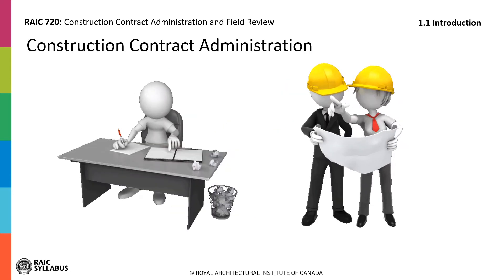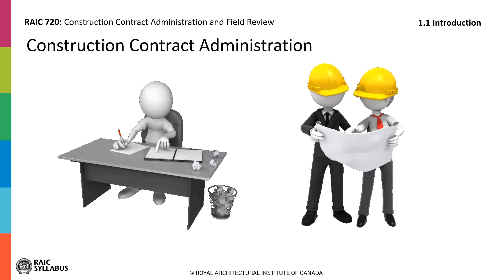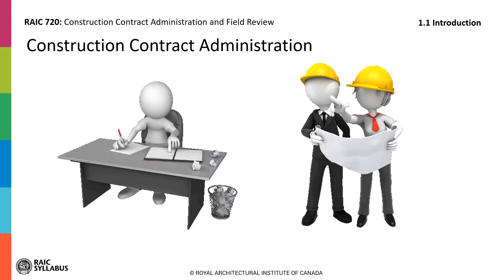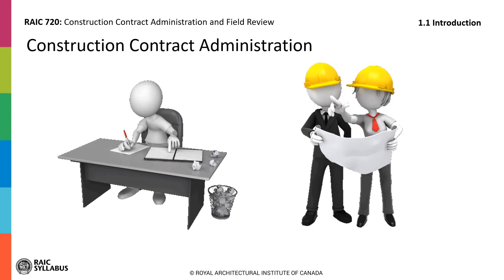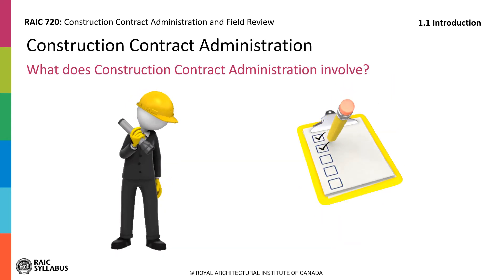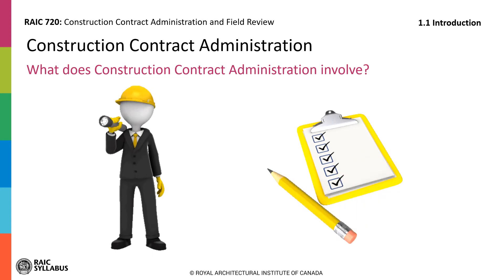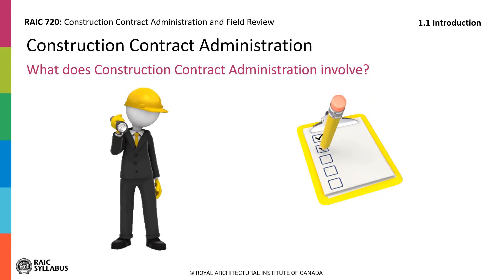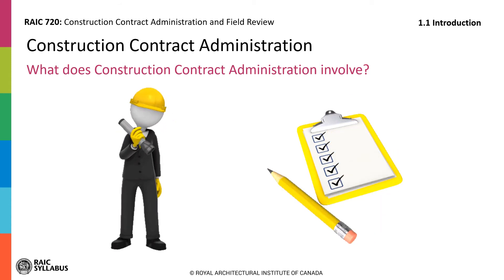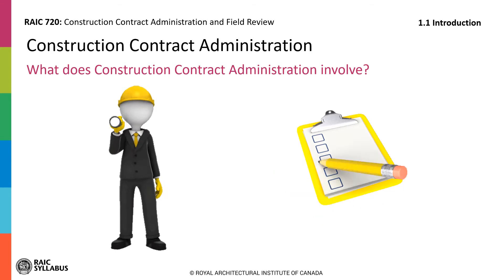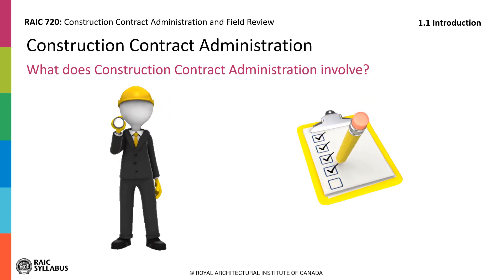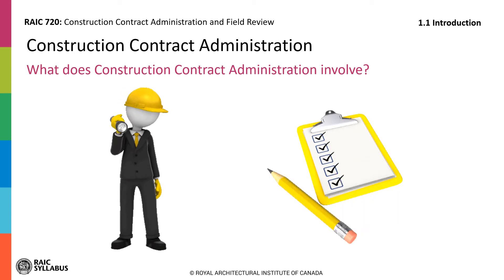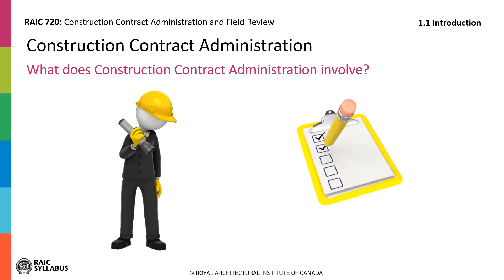Construction contract administration includes both office functions and field functions. These are not two different roles, but reflect different activities and responsibilities of the same role. The purpose of construction contract administration is to provide expert review of the work of the constructor, manage quality and validate scope through identifying non-conformance of the construction work when compared to the construction documents. It involves analysis of data gathered from construction site observations and documents review, and making decisions about whether interventions are needed to either insist that non-conforming work be rectified or change the design through the change process.